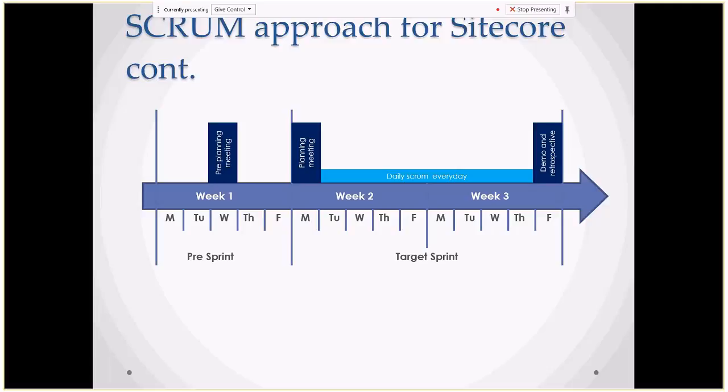No, actually, that is a good question. This is what we practiced earlier. We didn't have a pre-planning meeting. So when it came to the planning meeting, we found that developers were not able to clearly understand the requirements, and they were not able to provide a better estimate because of that. So then we introduced this with test-driven development, where we get the requirement early, then we can write the test cases as well.